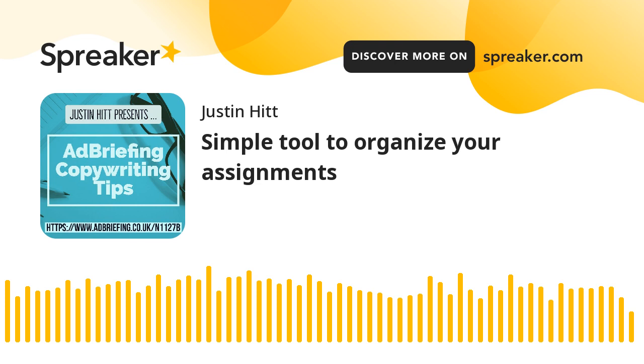There's going to be people that want to look at it and mull over the idea. They're thinking about it. No, you need to know before the project starts, when this sales letter is done, who will be the final decision makers. That way you can get them a draft, you can get their feedback, you can incorporate their feedback and be finished with the writing assignment. See, a lot of people will teach you how to use words that sell, but you need to use this language, this copywriting language, in order to bind the customer into both expectations and agreements on how work will be delivered.